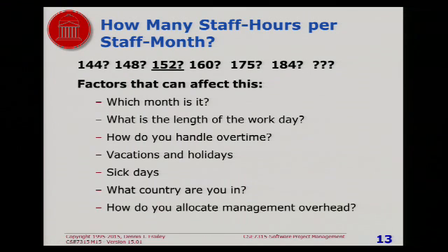I was once giving a talk on this in Wisconsin, and they told me, yes, the shortest month of the year in Wisconsin is October. I said, October is a long month. How come it's the shortest month? And they said, because the first Monday of October is the start of hunting season, and therefore everybody takes a week or two off. Now, I went and taught another course in Munich, Germany one time, and they said, our shortest month is August because most people take their vacation in August. So you have to know what you're dealing with in order to use these numbers correctly.